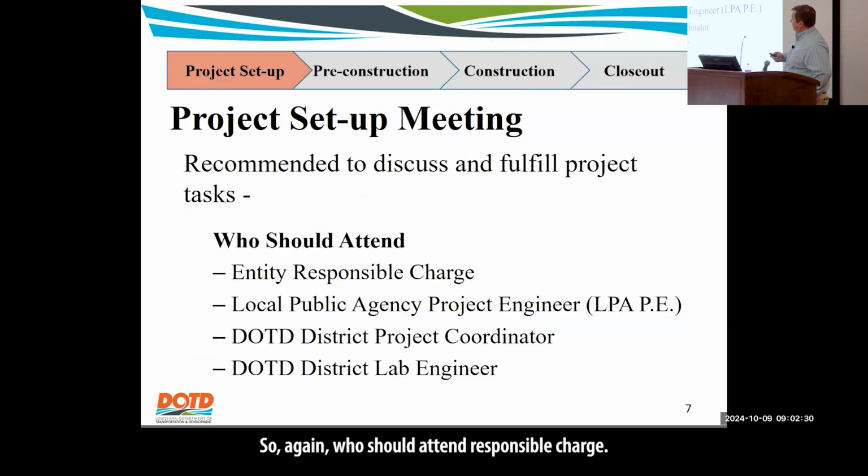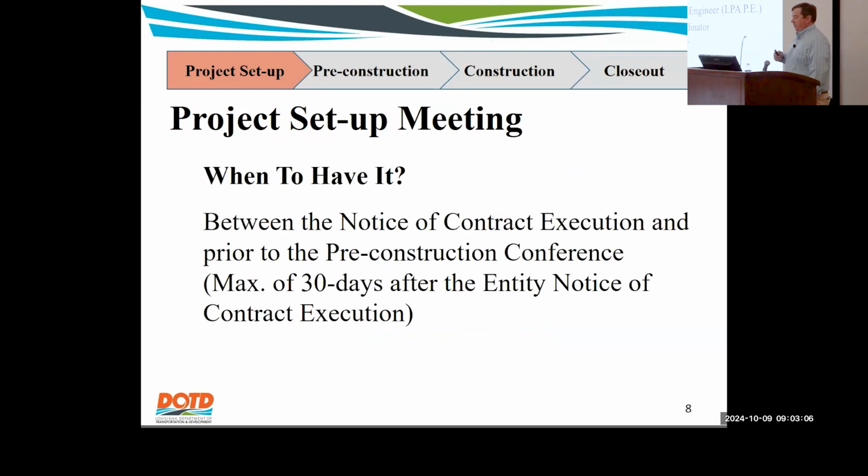So again, who should attend: responsible charge, consultant PE, our project coordinator, lab engineer if we are performing the testing for y'all. Again, that's in your entity state agreement, ESA, we'll use that acronym a lot as well. So make sure you're aware of who's responsible for what, because you want to know that before you get to this pre-construction conference and start talking to your contractor, and he's wanting to know, all right, well, where are the samples going? How quickly should we be getting those back? That sort of thing.